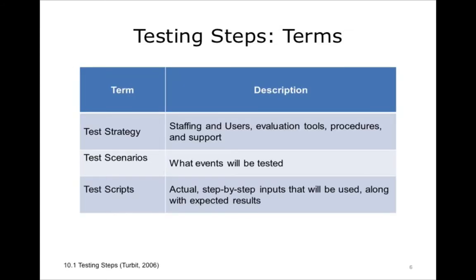Here are three terms you should be familiar with related to UAT. First, test strategy: you will need to devise a test strategy, which includes who will be involved, what special equipment or software will be needed, what procedures will be followed, and what other support mechanisms will be needed to ensure successful testing. Second, test scenarios: you will need to decide what events will need to be tested. Third, test scripts: once you have decided on the events to be tested, you will need to develop step-by-step instructions, including specific inputs that will be used for each test, as well as the expected results.